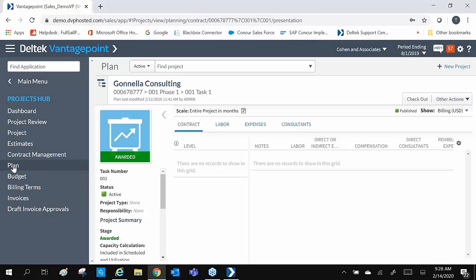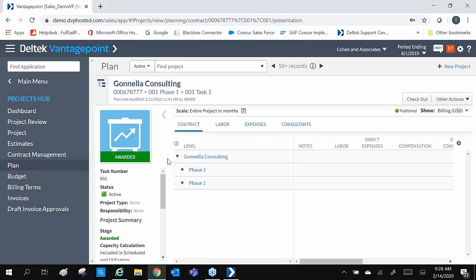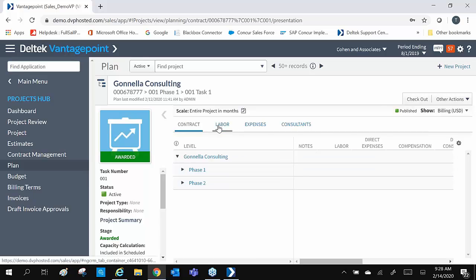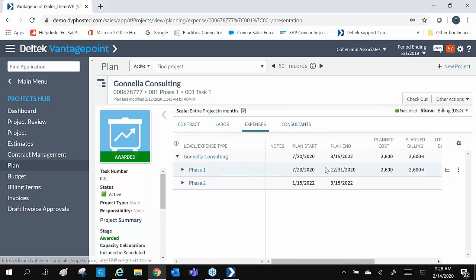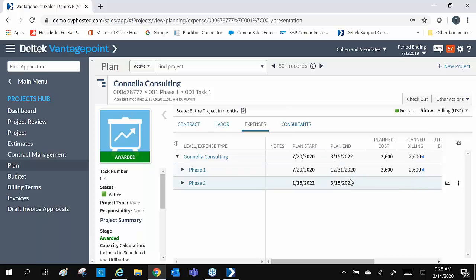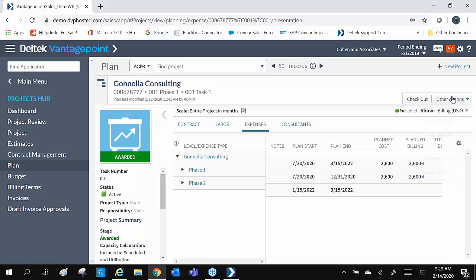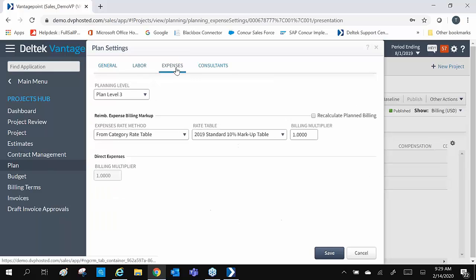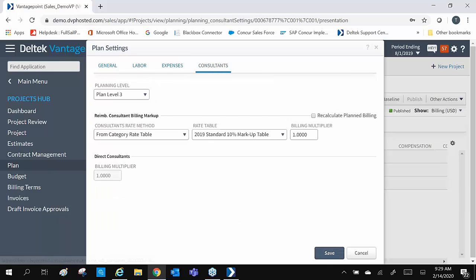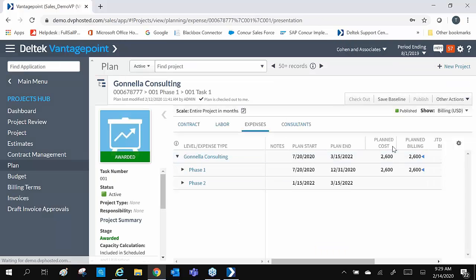In our plan, we can also see our structure. When we go to our labor and expenses tab, we see our plan and end dates that have been populated from the projected milestone. If you needed to change the plan settings for this project, simply click on Other Actions and Plan Settings. Make the changes that you need and click Save.